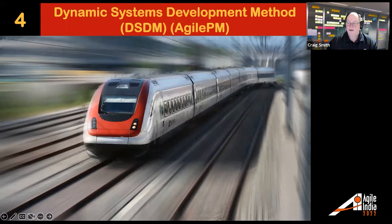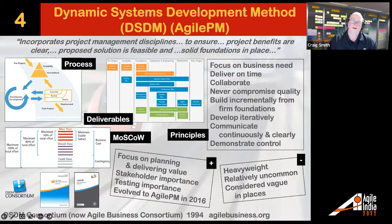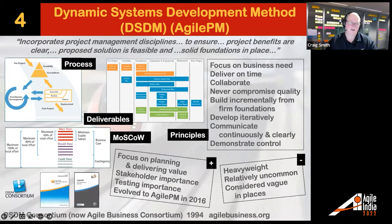DSDM was particularly popular throughout Europe in the 1990s, dating back to 1994. It was more structured and aligned to project management techniques of the time. If you're familiar with the MoSCoW technique — Must-have, Should-have, Could-have, Won't-have yet — that was described inside DSDM. In more recent years, in 2016, it evolved to something called Agile PM. It's relatively uncommon today but keeps popping up, and there is a lot of good stuff in there worth looking at.